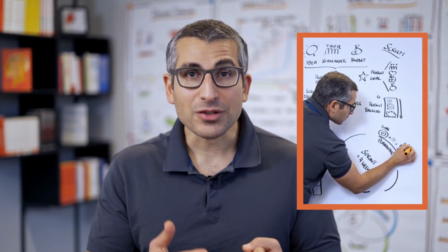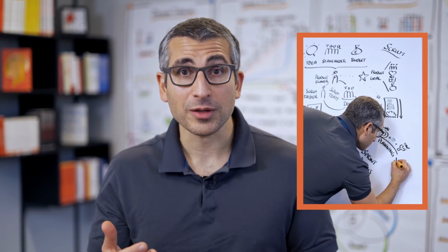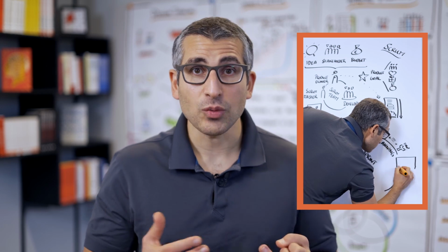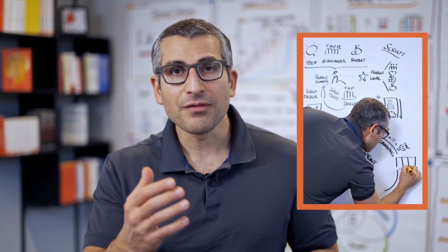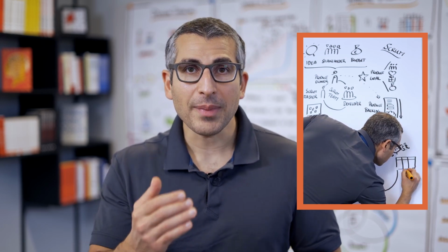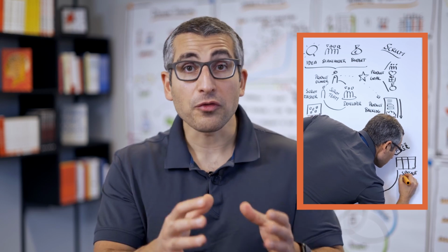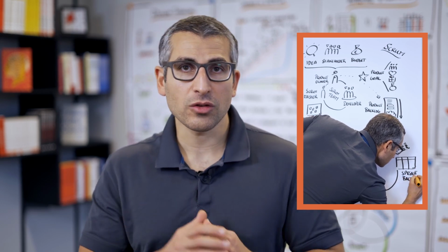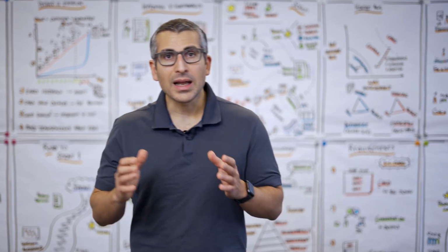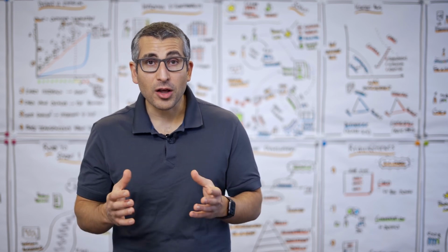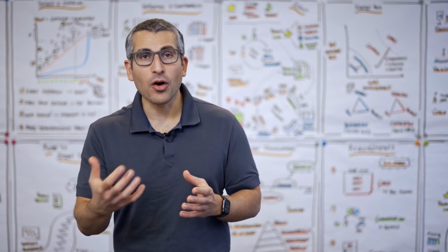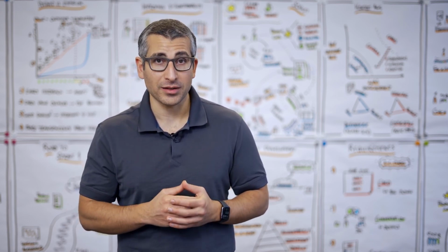Then, based on the priorities that we have in our product backlog and the capacity we have as developers, the developers select a certain amount of items and move them from the product backlog into the sprint backlog. Last but not least, the developers talk about how they are going to implement those items.